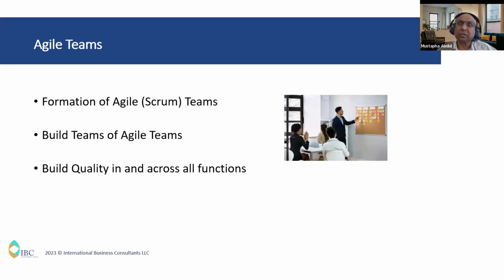The other role is called the product owner, and the product owner, together with the Scrum Master, actually bring the team together and guide the team, with the product owner bringing the information from the product managers or the marketing department or the customer, for that matter. It could be an internal customer, it could be an external customer. So the product owner is a link to the customer, whereas the Scrum Master team coach is facilitating the events or the meetings and guiding the team to stay within the framework of Agile.